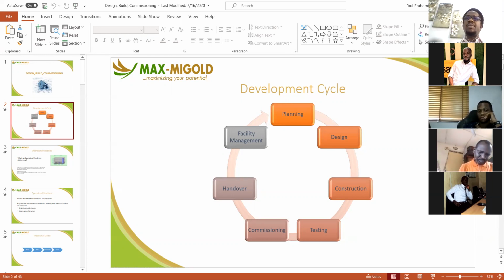If you are trying to commission a stairwell, for example, this stairwell is designed to evacuate 50 people per minute from each floor. Fine, ring a bell. 50 people should run out of the building and walk downstairs, and let's see whether anybody got a fractured bone, or somebody got sprained, or somebody fell down, or was pushed in the process, or whatever happened, right? Or how long it took to actually come out, and do that calculation to say, oh, this stairwell is commissioned okay, right? So that's the difference. So let's try and know that clear difference so that we don't make the mistake anymore.